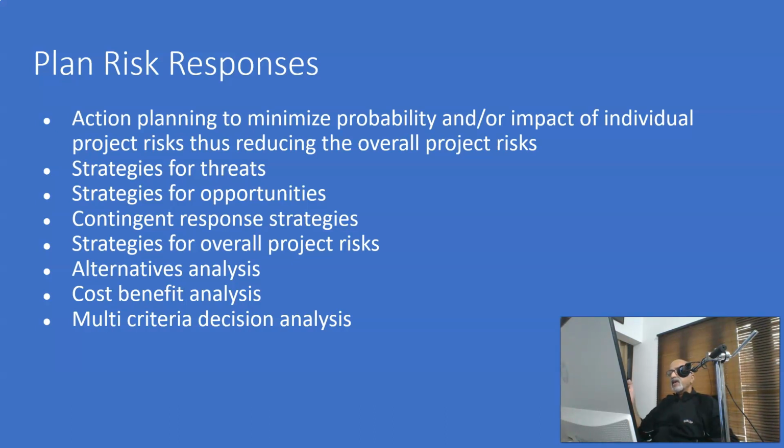An earthquake is happening now, and what you are supposed to do if you are inside the building, that is a contingent response strategy. Then strategies for overall project risk, how to deal with it, alternatives analysis, cost benefit analysis, and multi-criteria decision analysis. All these are tools and techniques used for plan risk responses.